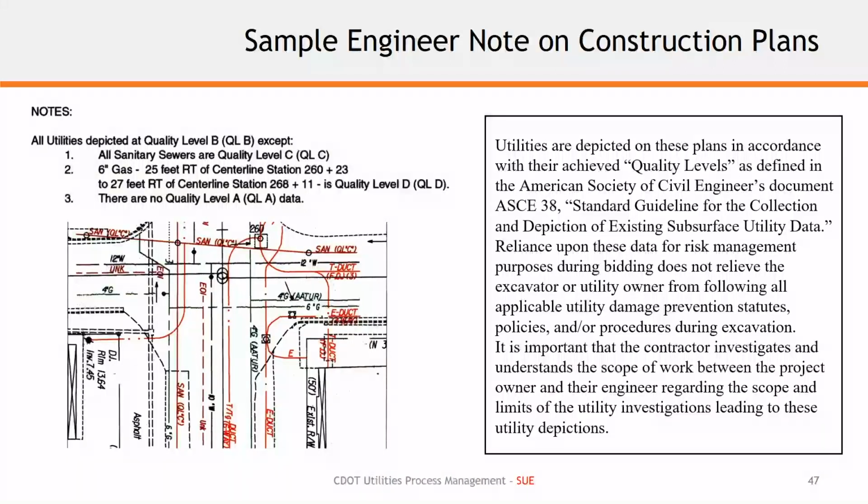And then it goes on to state the reliance upon this data for risk management purposes during bidding, that kind of stuff, but it doesn't alleviate the contractor of their due diligence, and they're still required to complete their investigations. In our case, state statute says the contractors have to do their own locates, call them in, things like that.